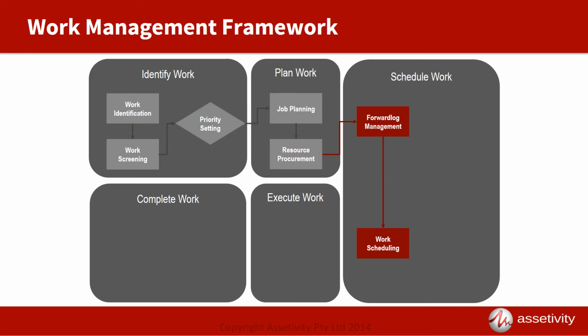In preparing the schedule, the scheduler needs to maintain visibility of backlog tasks, jobs scheduled for completion previously but not done. Backlog can be a useful way of managing peaks and troughs in maintenance work, but it can also be a major source of risk if not well managed.